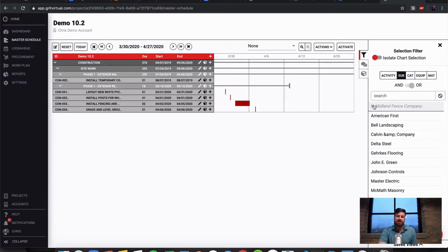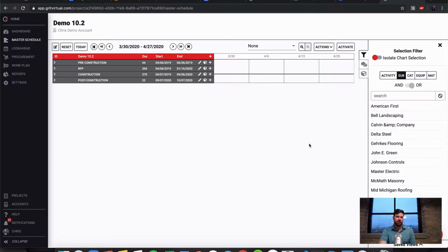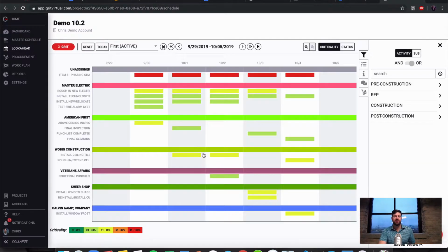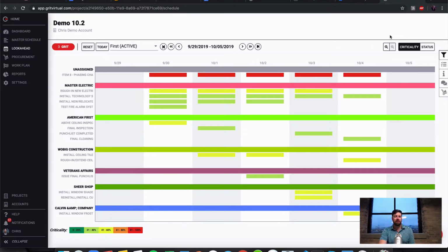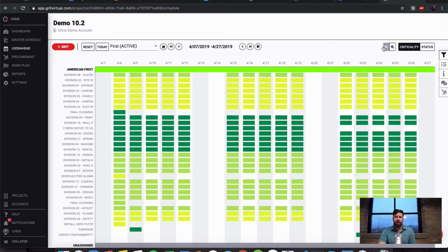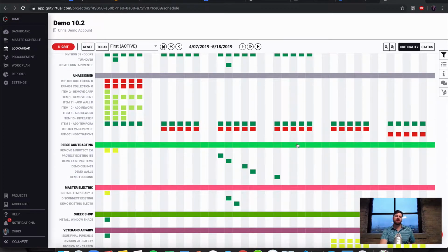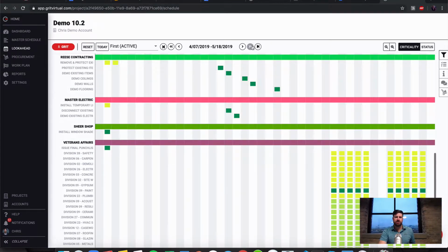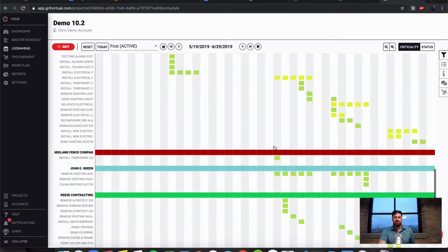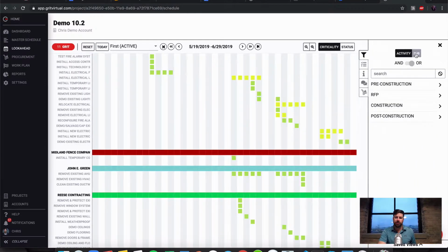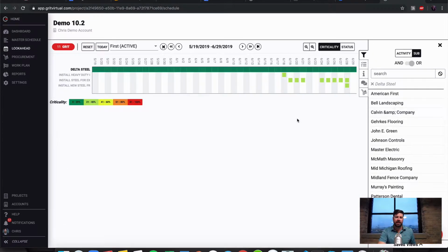So rather than having a document, we want to send the data to the field so that it can be used in a new way. That automatically feeds into a look ahead. So this is similar but slightly adjusted from the last look ahead we have with a 1, a 3, and a 6-week perspective that breaks down the schedule into the individual subcontractor swim lanes. So that you can see that over time, once again, the subcontractors can really focus on exactly what they care about.